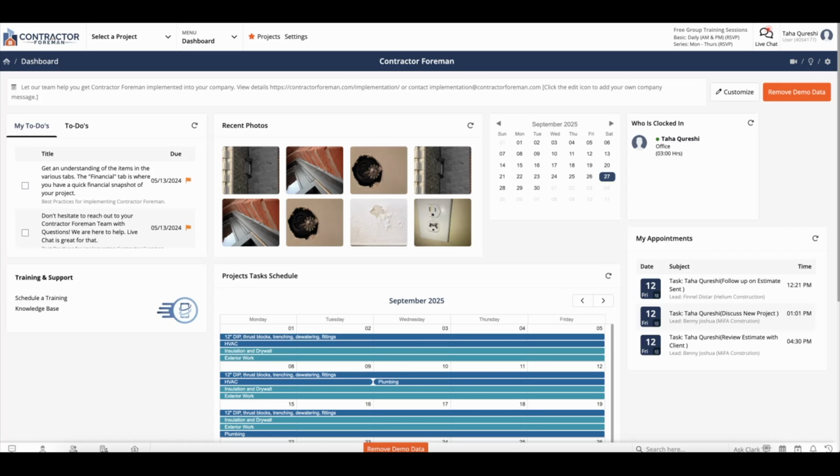For example, you might be thinking of a work order as a change order. However, there's an important distinction. Think of a change order as a modification to something that's already part of the contract. For example, you might be swapping tile flooring to hardwood instead. A work order, on the other hand, adds something entirely new to the scope that was never in the original agreement. Maybe you're just remodeling a kitchen, and the client decides they'd also like a patio or a pool. That's a new scope of work, and it's added to the project through a work order, not a change order.